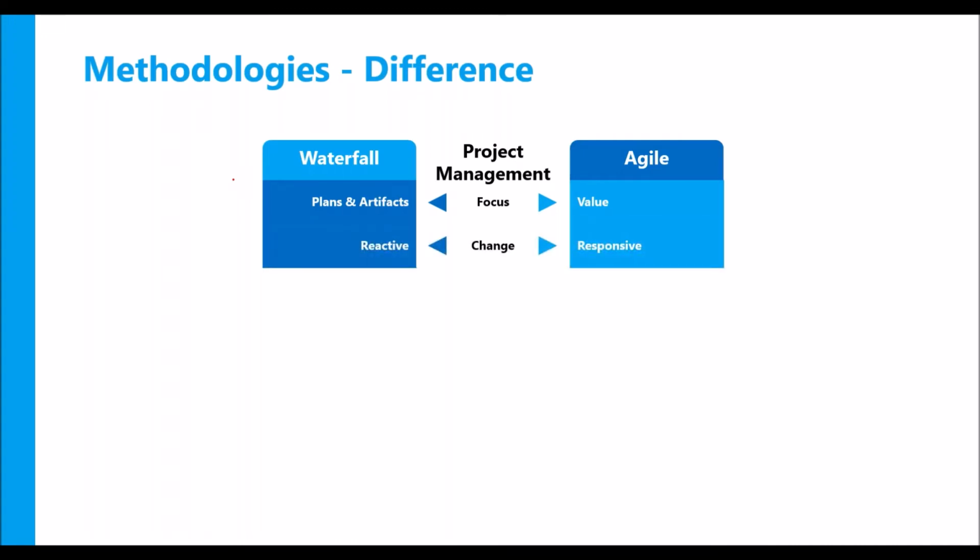So how do you handle changes, right? In Waterfall, it's very reactive. If you have frozen your requirements and you are executing your project, changes are very minimally encouraged, right? Every change has to undergo a huge process of approval and analysis. Whereas Agile welcomes change. In fact, one of the founding principles of Agile says respond to change over following a plan. That's a core value of Agile, one of the four values of Agile. Which means Agile is change friendly, whereas Waterfall is change averse.